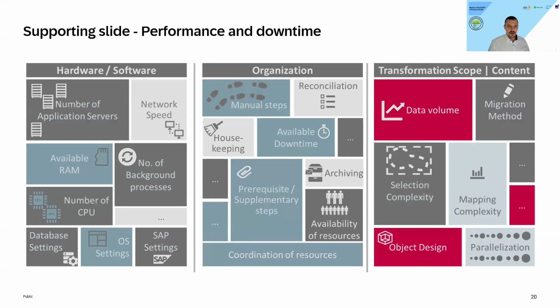As a next step, talking about the transformation complexity, so selection, but also the mapping part, we are always aiming to keep it as simple as possible, to also have tests available, and so that it is still understandable what the transformation is about. But also in the direction of downtime, pick the correct things, not everything you want to do, but really everything which is necessary here. And also bring tool-supported parallelization into the migration. And basically these are the different factors.